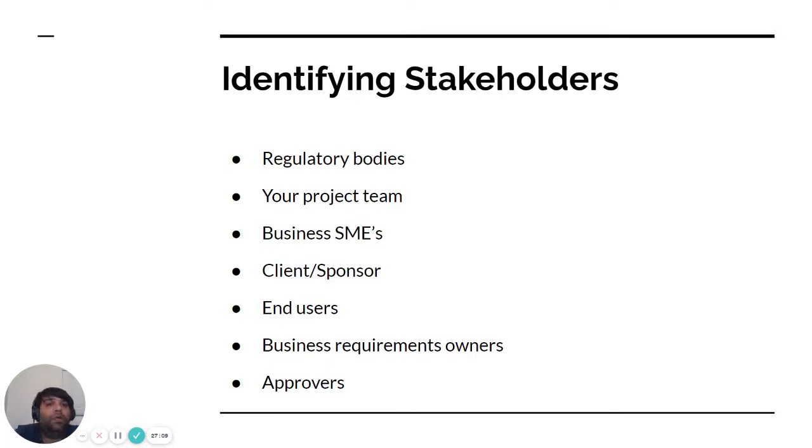You need to know who is approving your document to make sure to capture their requirements. Sometimes you elicit from the owners, but the approvers do not approve the BRD because they were not involved in the elicitation process. So sometimes you provide your requirement documentation for approval, but some people won't approve it. Before you provide the documentation, you have to do a meeting, talk with the people, interview them, and elicit all the necessary requirements and ask all the necessary questions. If you are not able to do that, they will not approve, 100%. So you have to identify all the people and then talk.